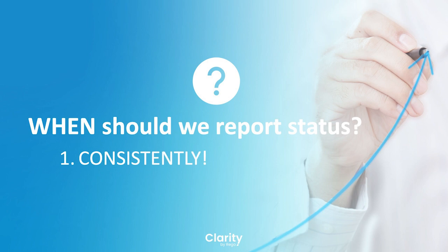Thinking of a couple of other considerations, let's say you're in a hybrid environment. Maybe you have some agile practices as part of your project delivery, and you're delivering work in 2-week sprints, and you're still expected to deliver regular status reports. So in that case, maybe we want to do a status report at the end of every sprint. And further, it might morph a little bit to align with those agile practices, and it might become closer to what we might call a sprint retrospective. But that's a topic for another day, another webinar.